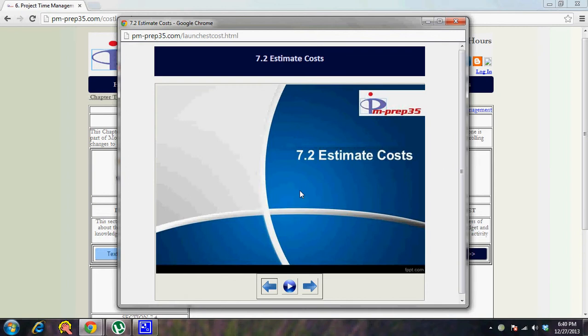If you understand the structure of how activities are positioned, you have the project phases, then the project phases have deliverables. Deliverables are broken down into work packages. The work packages are in turn decomposed into activities, which become the activity list. You can allocate your costs at the activity level, or you can roll all of this up for each of the activities to come up with the project cost estimate.